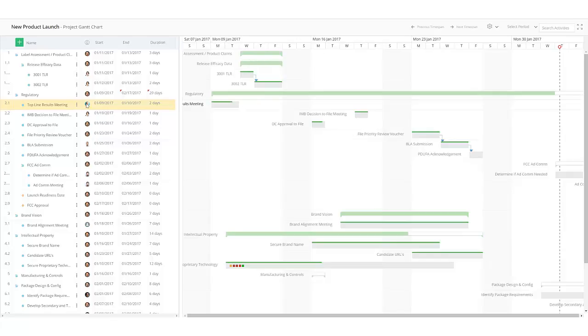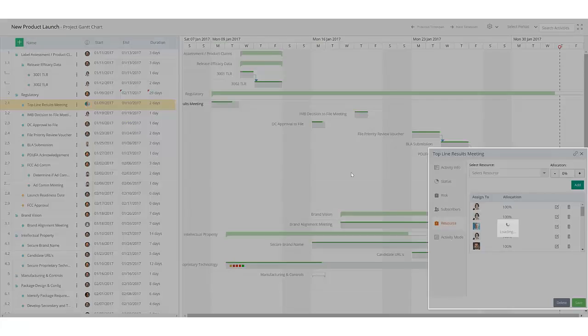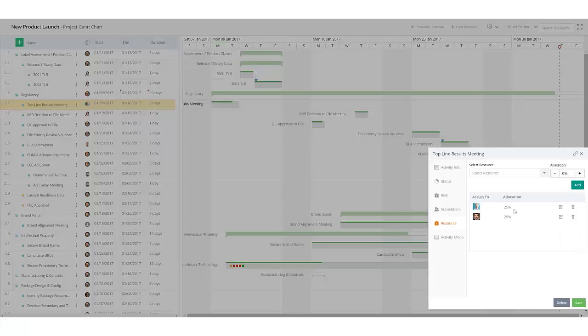So 50% was there before, I add 2 people, and now dynamic assignment makes sure that the start and end dates don't move. However, the percent allocations for these remain constant, and that will impact your resource management analysis when you use Leankor's resource management module to visualize how many hours per day certain individuals are allocated to projects.